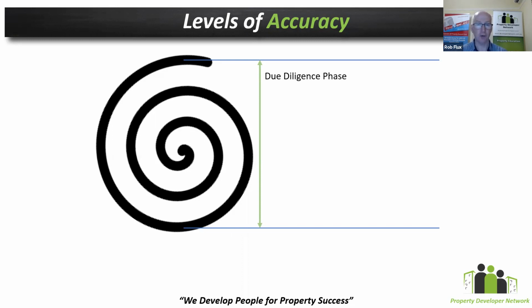Now, as you go through to the next stage of the project, you get your development approval. At this point, you get a little bit more certainty. Firstly, you know what your development approval costs have been, so they're pretty much already locked in place. And you also know the conditions that council are going to invoke on you in order to take the rest of it through to completion. So now you can actually start to cost things with a lot more accuracy.